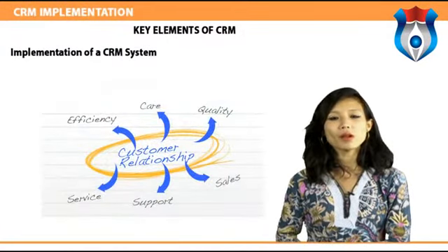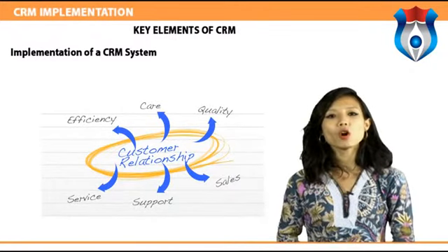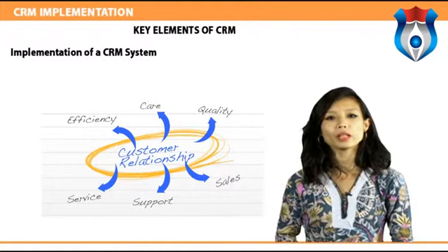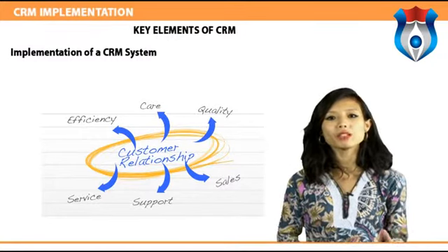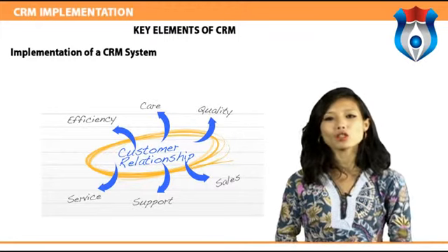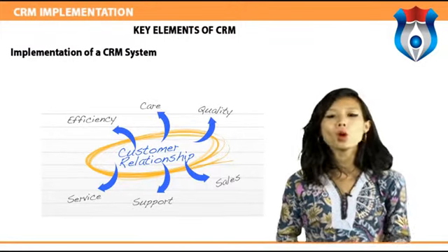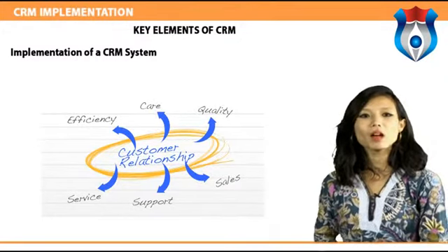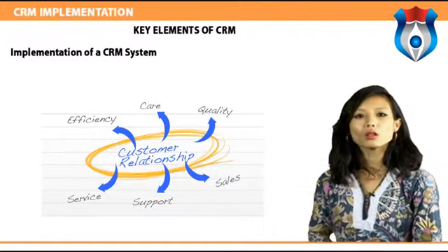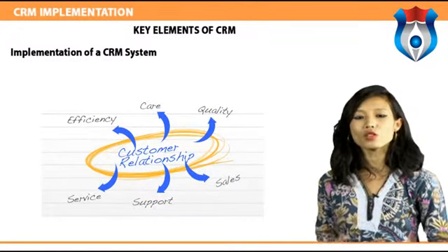Implementation of a CRM system. Develop a customer-focused strategy first before considering what kind of technology we need. Break the CRM project down into manageable pieces by setting up pilot programs and short-term milestones. Start with a pilot project that incorporates all the necessary departments, but is small enough and flexible enough to allow tinkering along the way. Make sure CRM plans include a scalable architecture framework.